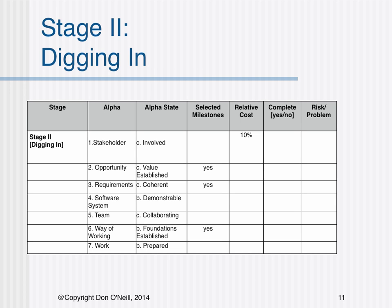Stage 2 entails digging in as a project. Stakeholders are involved. The opportunity value proposition is established. Requirements are coherent. And the software system is demonstrable and feasible. In addition, the team is collaborating, the foundations for the way of working have been established, and the team is prepared to work. The critical selected milestones revolve around opportunity value, coherent requirements, and an established way of working.